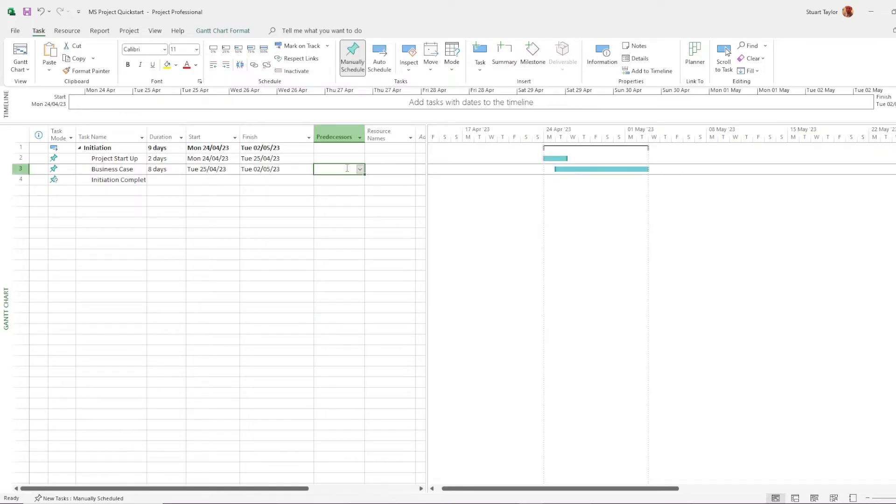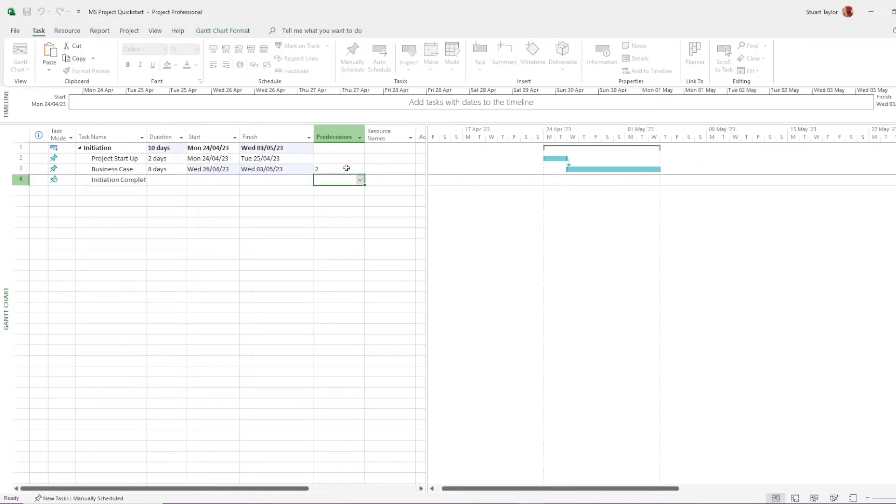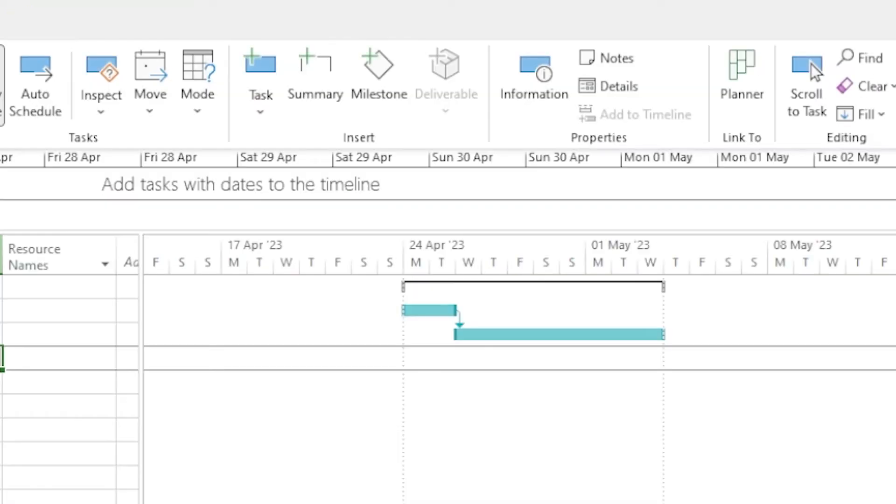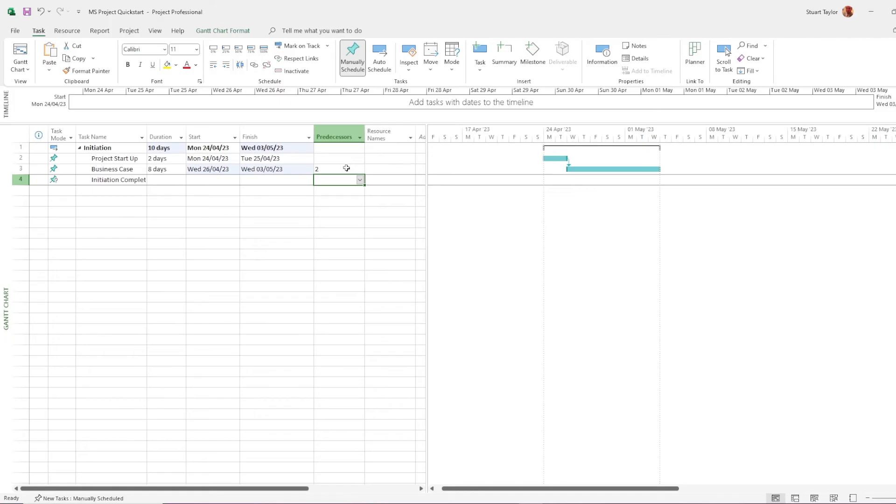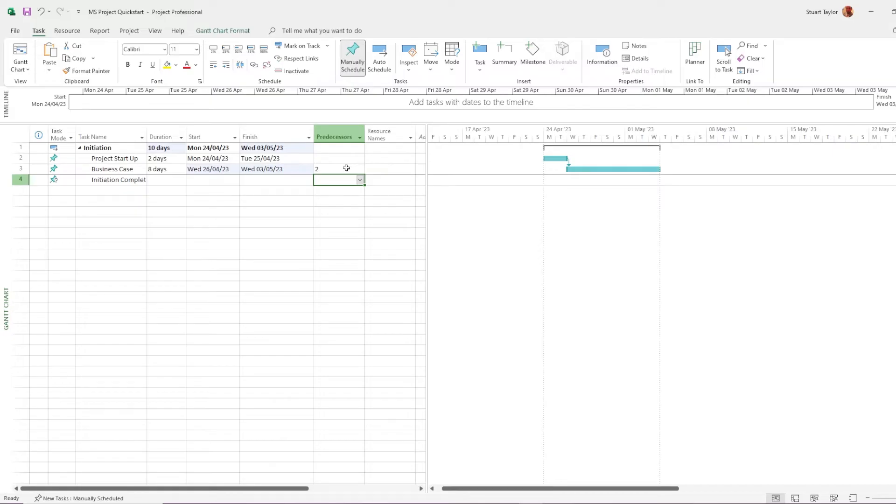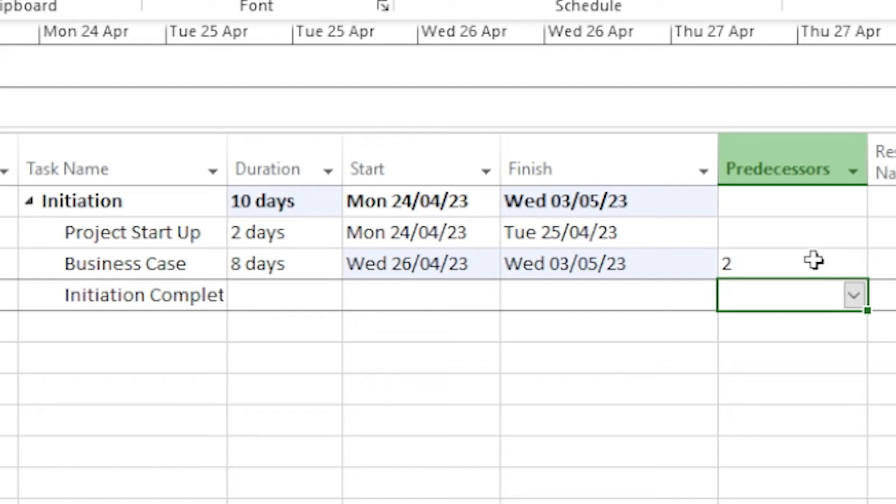This is where project starts to really show its power. I've entered the number two there in the column predecessors on row number three. And what that's telling this is that row number three is dependent on row number two. And you see in the Gantt chart section over on the right-hand side, there's now a little arrow connecting the two rows together. The relationship here is a finish to start. When the first task finishes, the second one starts. There are other variations of these relationships. You can have dependent tasks that are starting earlier than other tasks or finishing, or you can have them waiting for a while. We'll get into all of that in another video. So make sure to hit the subscribe button so you don't miss it. You'll notice as we're amending the task dates that the stage dates are changing as well.